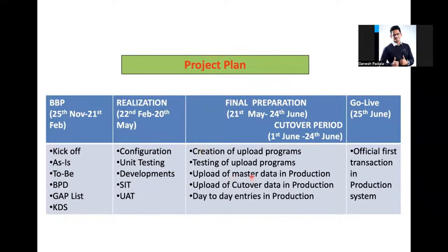All the master data is cut over and updated in production, then the day-to-day entries start being entered. When they go live, the business does the first transaction officially, on the live date. In the last one week, they might have done overlapping activities, but this is the official one, which happens on the go-live date. Any cooling period, one week or one day or a few hours, will also be considered for the activity. So this is about the differences between SAP and Activate.